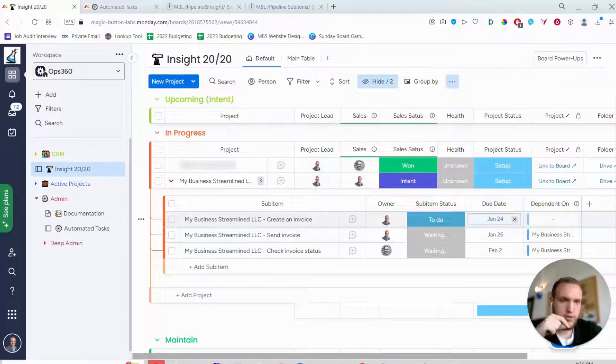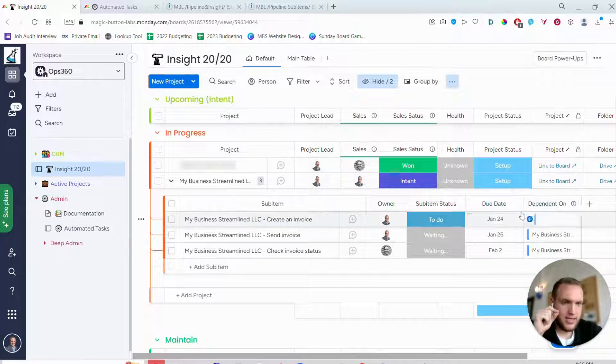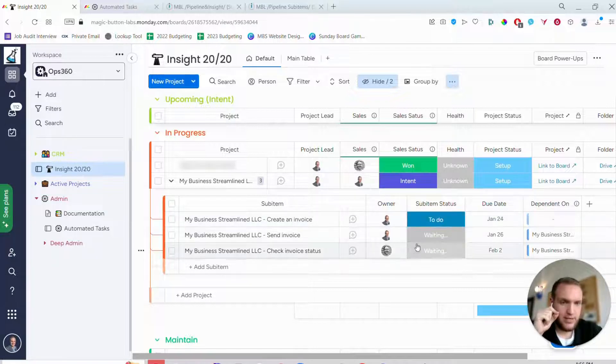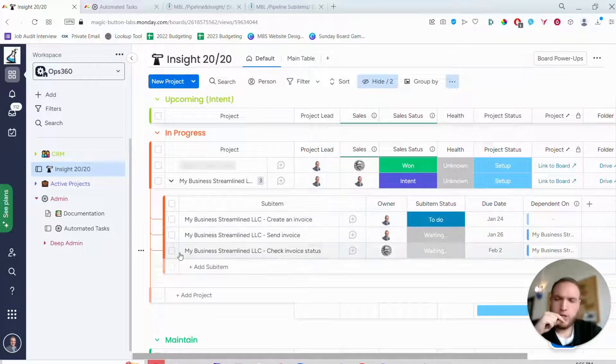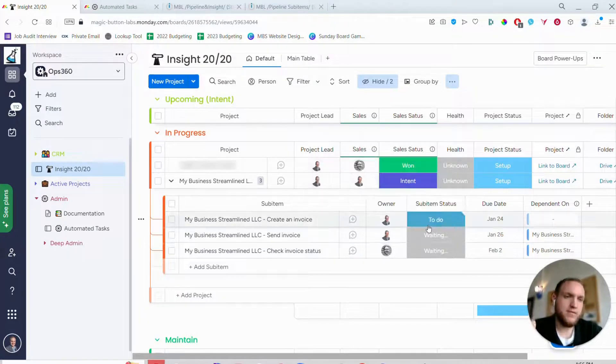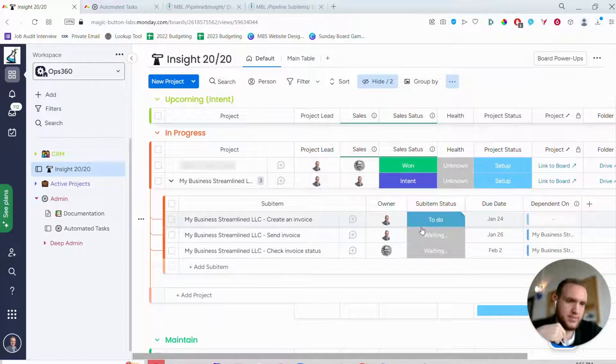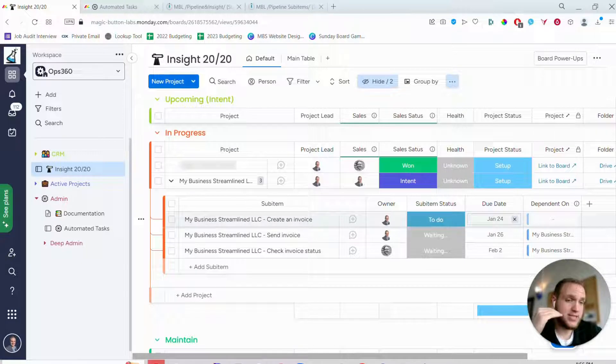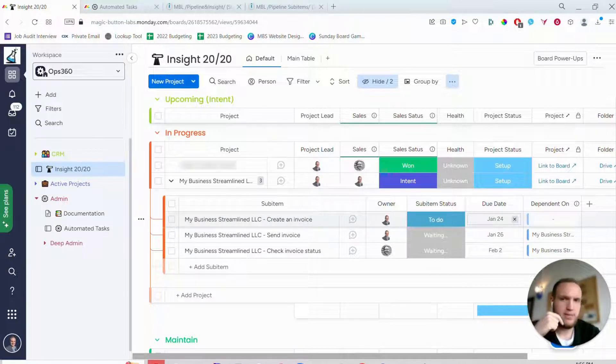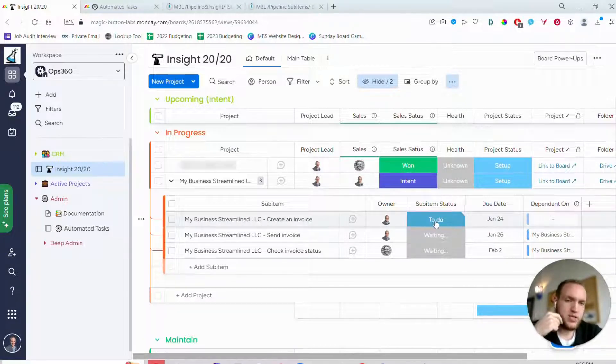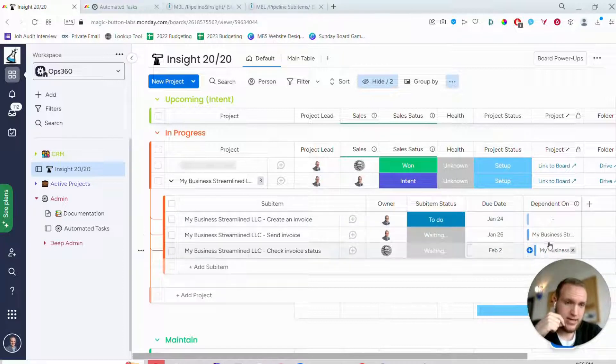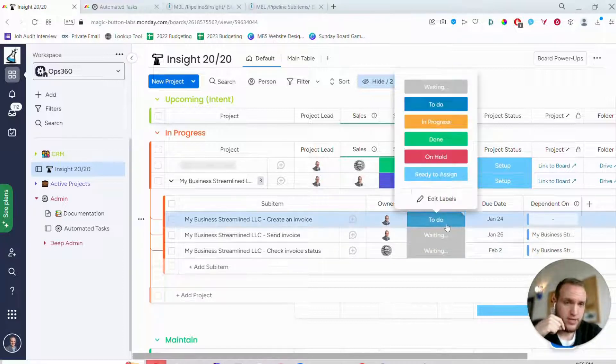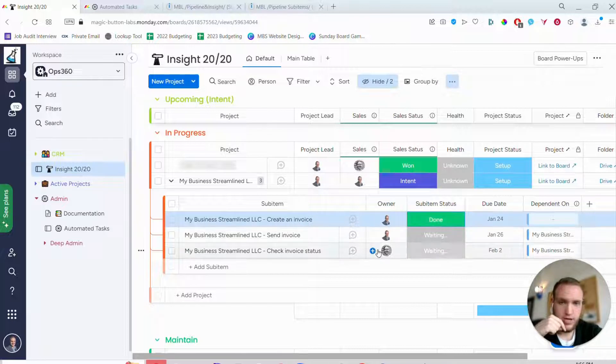We'll see here too we have dependencies. So these two tasks are dependent on this first one. Normal dependency mapping won't allow you to be able to kick off the subsequent tasks - it'll only allow you to display them on like a Gantt chart type view. But what I did was I made it so that whenever a task that is dependent is completed...